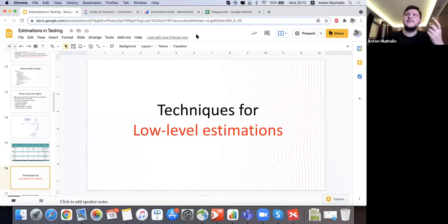This comes from the well-known planning poker, right? When you have certain cards that you can take, it's much easier for you to choose. So you just contact the person and say, okay, hey, how many days? 1, 2, 5, 10? Person: well, maybe 2, maybe 3. Okay, you think it most likely will be 2 or 3? To just narrow down the estimation. Say, well, probably, I guess 3. Here you go. You have this estimation.